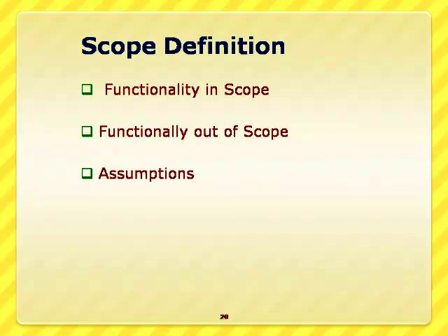Traditional implementation. Let us discuss the scope definition statement. We need to define the functionality in scope, the functionality out of scope, and under what assumptions we are going to build the data warehouse. This is very essential for the smooth implementation of the data warehouse project. What functions am I going to include in my data warehouse? What functions am I not keeping inside the data warehouse, and for what reasons? Under what assumptions am I building it? These three factors are to be documented perfectly,